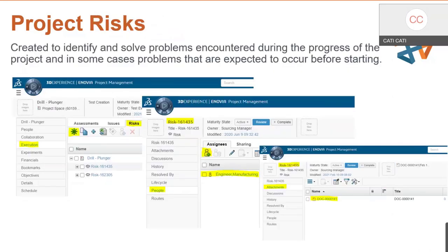Project risks are created to identify problems. You can create a risk before a project begins, as the project progresses, or at the end — it really doesn't matter. Sometimes you go into a project already understanding some risks involved and can start those right away. Others arise as you go, such as going over budget, a resource not being available, or a part not being available.